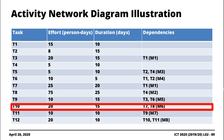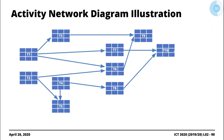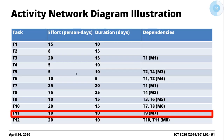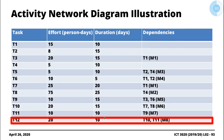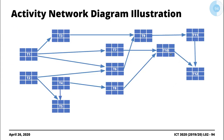T10 has a dependence on T7 and T8, so arrows point to T10. T11 has a dependence on T9, so there is an arrow from T9 to T11. Finally, T12 is dependent on T10 and T11, so arrows from T10 and T11 go to T12. This completes our dependency tree.